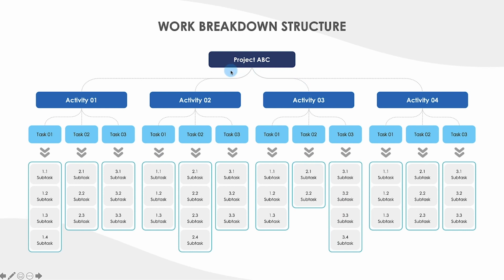The top level is the project title, a final deliverable, or it could even be a new feature. The second level is the controls account. And the next row is the work packages section, where the groups of tasks that lead to your controls account are listed. Finally, there's the key activities section, where tasks needed to complete the work package are listed and grouped.